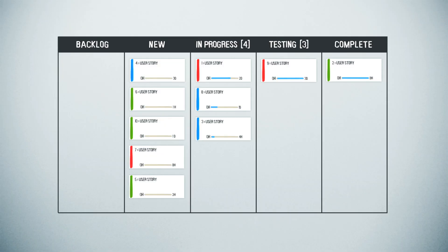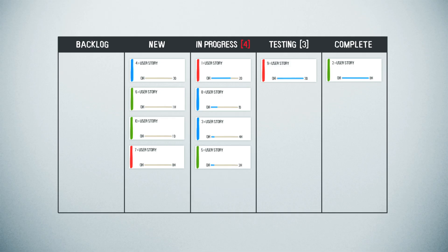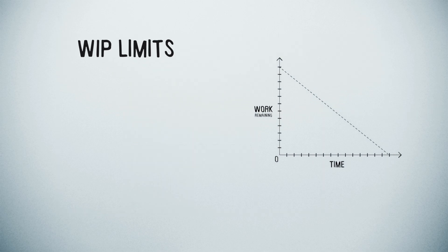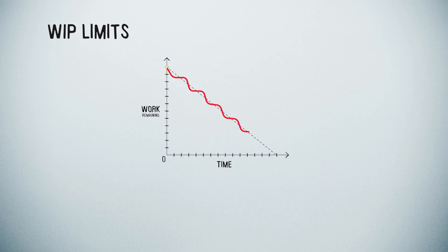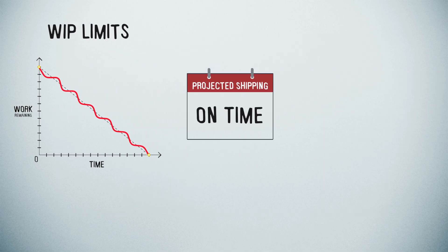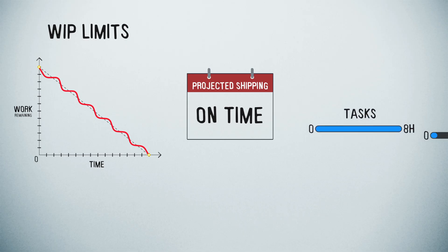Limiting the amount of work that's in progress means that you've got to finish some of the things on your plate before you can start on additional items. WIP limits help you keep work flowing, save time by eliminating too much task switching, and complete tasks.